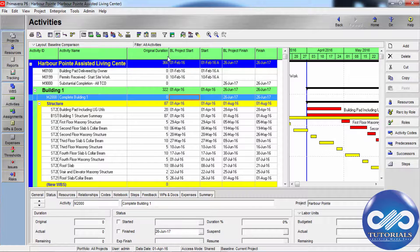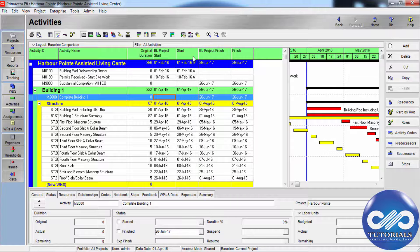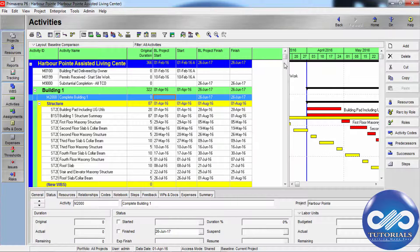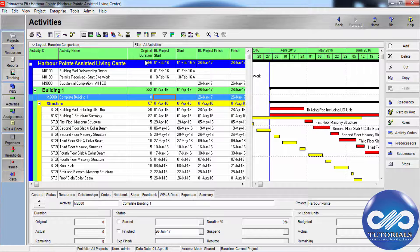In the list, you can add activities, include columns for planned value, actual cost to date and earned value to identify tasks that are behind schedule or over budget.